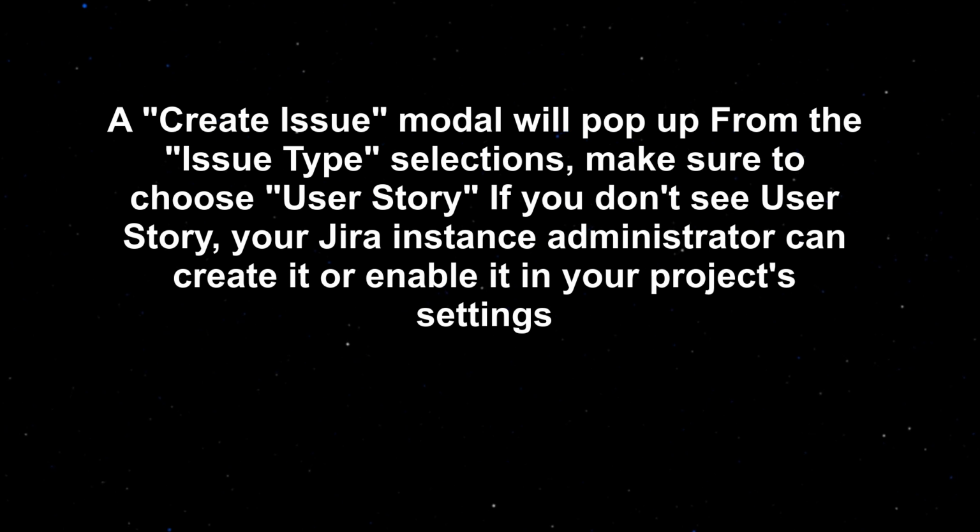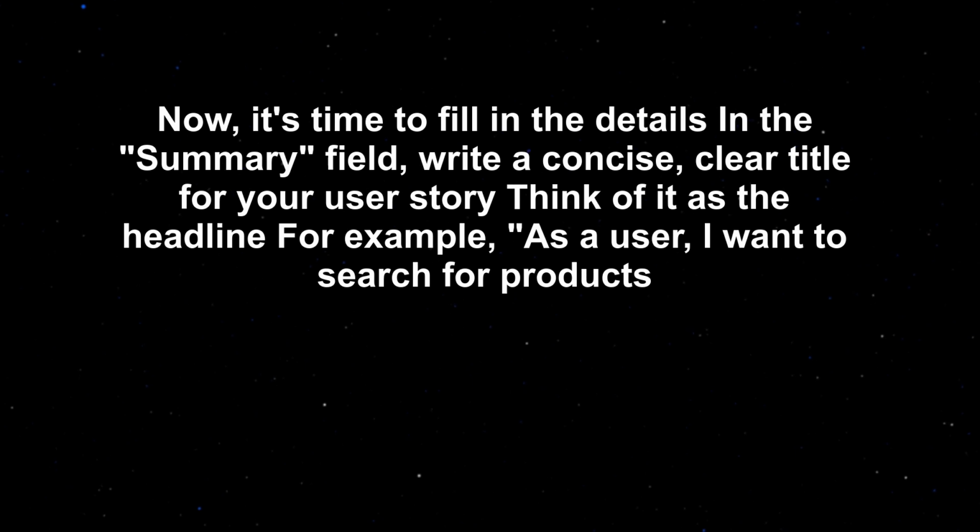A create issue modal will pop up from the issue type selections. Make sure to choose user story. If you don't see user story, your Jira instance administrator can create it or enable it in your project's settings. Now, it's time to fill in the details.